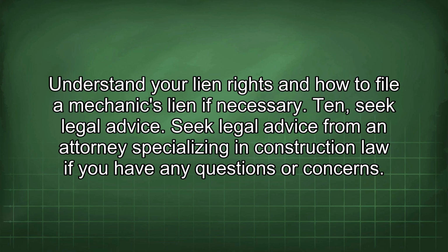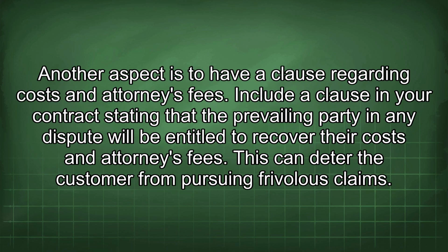Ten, seek legal advice. Seek legal advice from an attorney specializing in construction law if you have any questions or concerns. Another aspect is to have a clause regarding costs and attorney's fees. Include a clause in your contract stating that the prevailing party in any dispute will be entitled to recover their costs and attorney's fees. This can deter the customer from pursuing frivolous claims.